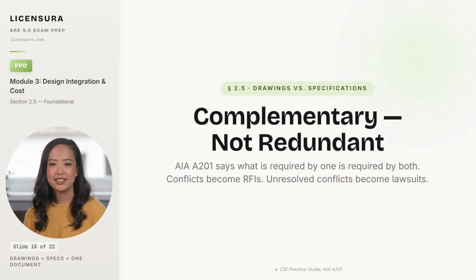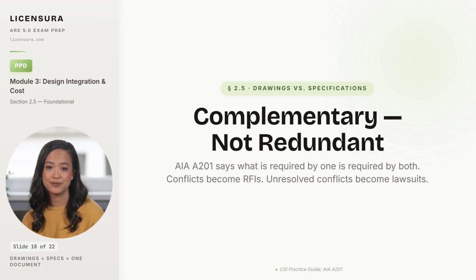Conflicts between drawings and specs become RFIs at minimum and disputes at worst. And unresolved conflicts end up as lawsuits, where the architect's documents get scrutinized line by line for ambiguity. Let me show you what belongs on the drawings and what belongs in the specs.